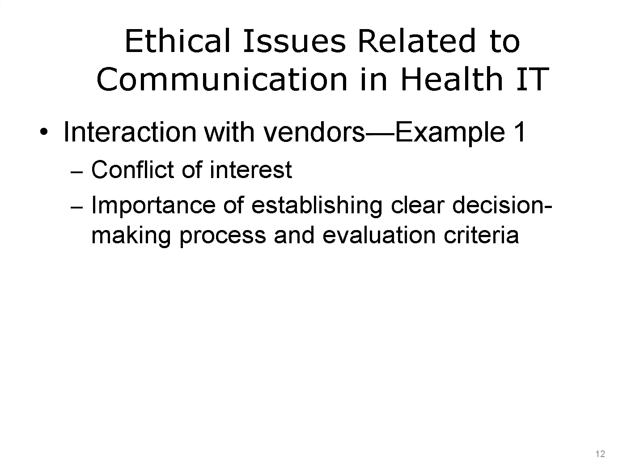One option is that you could discuss this relationship with your leadership and take appropriate action, which may result in your removal from the project to avoid any appearance of impropriety, unfair dealings, bribes, and kickbacks. Another option is to work with your IT team to establish clear evaluation criteria and decision-making processes prior to the engagement of vendors. This documentation would then be provided to all vendors interested in the competition, thus establishing a fair playing field among the competing vendors. Otherwise, giving an unfair advantage to one vendor over another not only is unethical, but also could result in legal action against the healthcare organization.